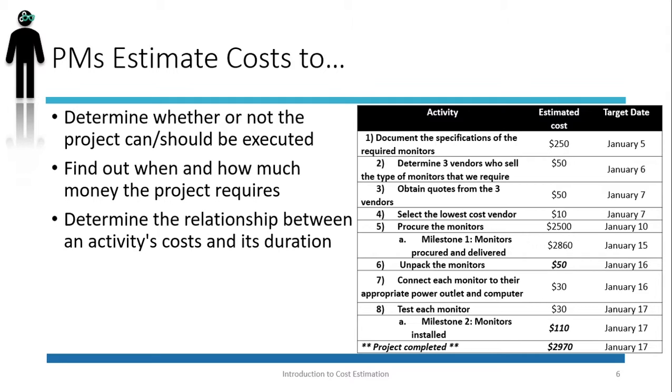In this case, we can decide not to use the expedited shipping and bring down the cost from $2,500 to $2,000. However, the catch is, if we use ground shipping, it will take 35 calendar days more than the amount of time that we already estimated.